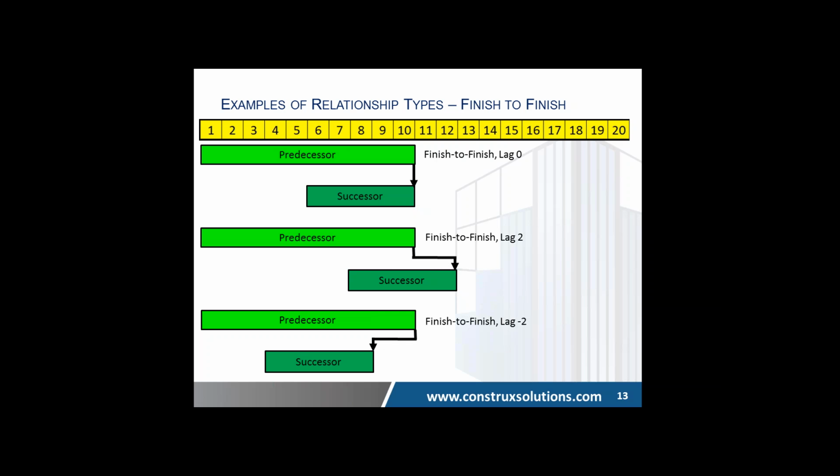Generally speaking, it depends on durations, but I have also seen activities that are tied together with a start-to-start lag 2 and a finish-to-finish lag 2, which is ultimately, you might as well combine those 2 activities and call them a combination of the 2 activity names. But for purposes of managing trade flow, it's a useful thing to do, and I believe that this positive lag is a useful thing to do.